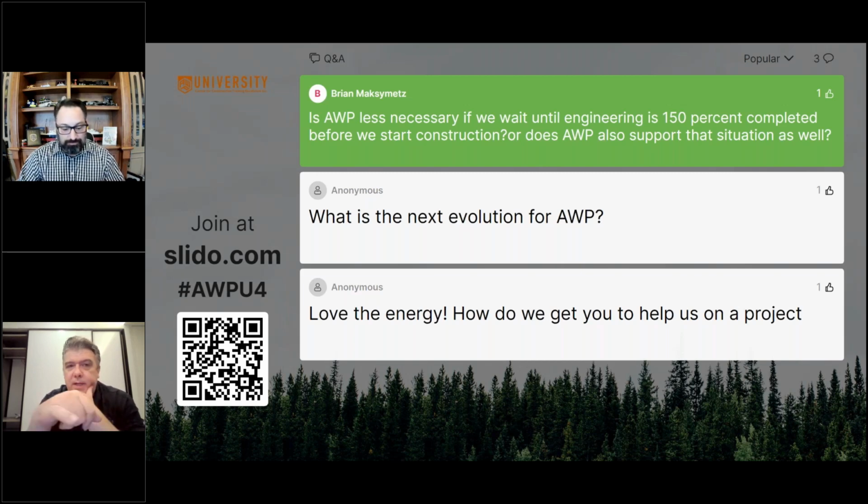I'll emphasize a couple of quick points as well, because it wasn't just getting more boot time. By building those packages virtually, we targeted 12 to 16 weeks, since you can't build them all at once. The project's going, so we got a rolling plan of the work being done, and we were refining. But coming back, we found engineering errors and omissions that then got course corrected because engineering wasn't 150% complete. Until somebody actually goes through the process of trying to build it, you don't find out where some of the more subtle issues are.